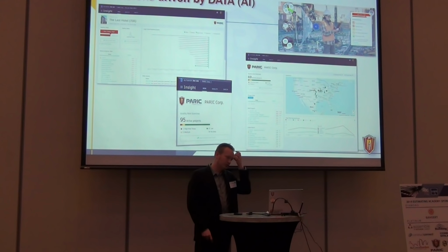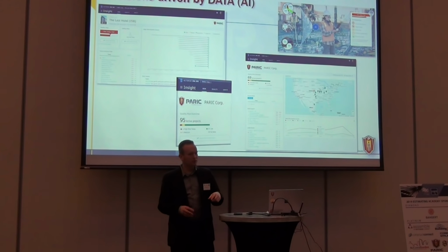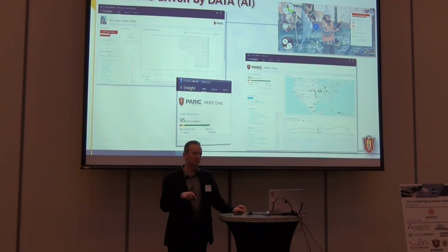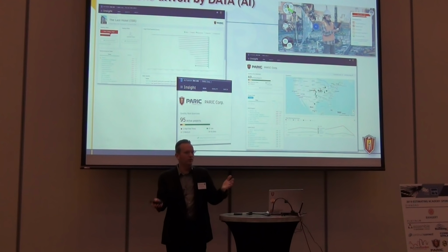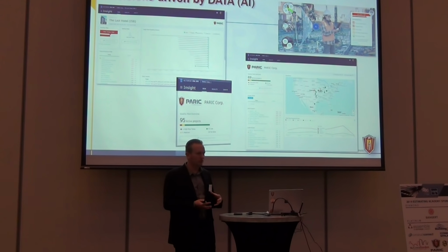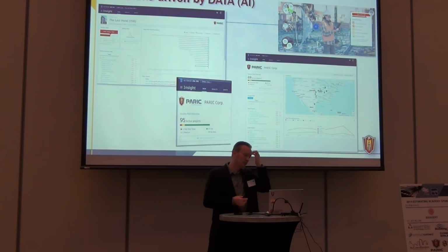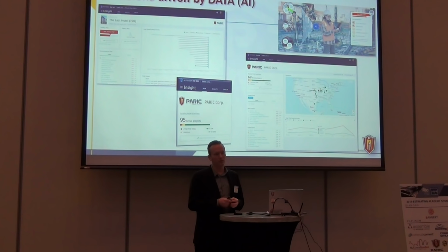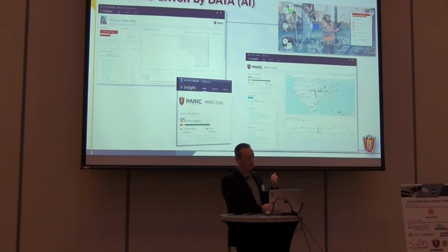This is a dashboard from our 360 suite where we're combining not only safety issues and quality issues, but we're mixing in a little bit of artificial intelligence so that it can read deep down into the issues that we have and identify what they are. Let's say we have 400 or 500 issues on a job. How many of those were critical? Water related, infiltration on the envelope, roof related. That's where you really eat up a lot of your budget on a project, where you have a little bit of fade. If we knew that of the 400 issues, 5 of them were really impacting our bottom line, that saves me from having to figure that out on my own. So that's where this tool comes in really valuable to us.